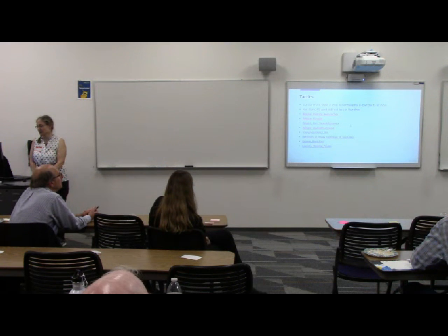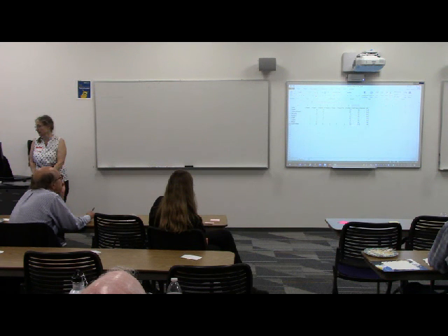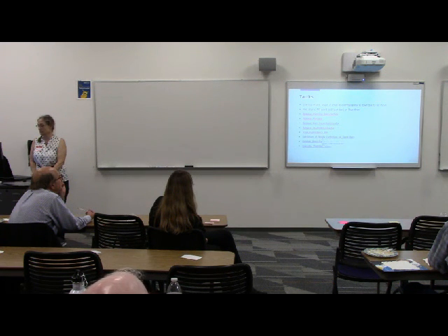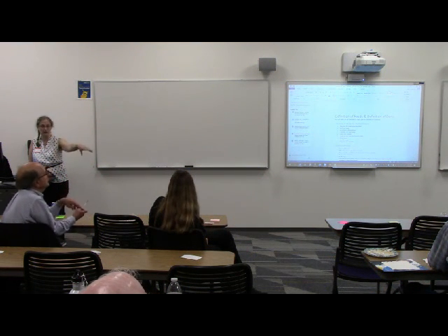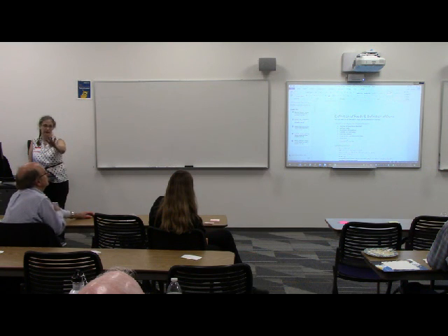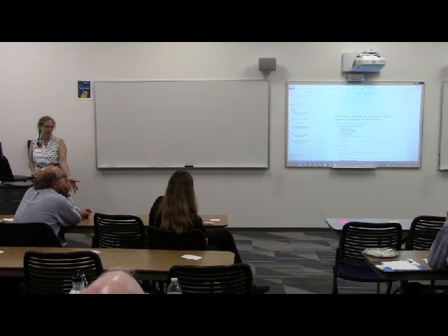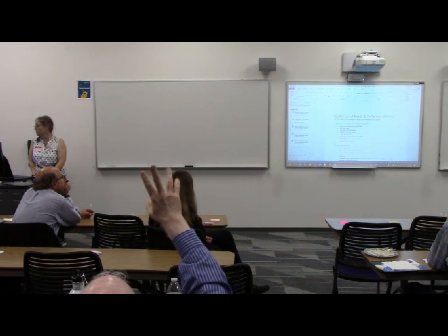Right? So then we also had a little electronic form for our vote of confidence. And as you can see, we had an average of 3.65. So confident enough to continue. Now, since we didn't have any, we did some work on a definition of ready and definition of done. This was, again, a SharePoint thing that I had people go in and add what they thought at the beginning, and then by the end of it, we reviewed it and picked what we thought would be appropriate. Shared definitions across all of the teams, and then each team could have their own, specific.